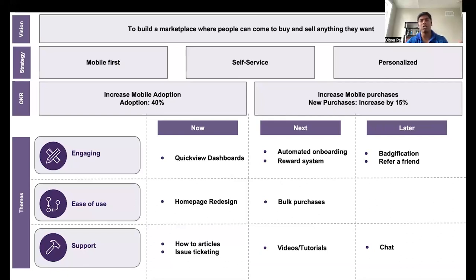Let's take an example of an e-commerce marketplace. Their vision is to build a marketplace where people can come to buy and sell anything they want. So they believe that their key strategies are being mobile first, complete self-service, and a more personalized experience for the users. This is how they plan to achieve their vision. Their feedback and past data showed that they are facing challenges with their product adoption, their mobile purchases, and many more challenges. But they want to focus on the above two outcomes, which is how can they improve their adoption to 40% and how can they increase their mobile purchases by 15%. That's the outcome they want to achieve.